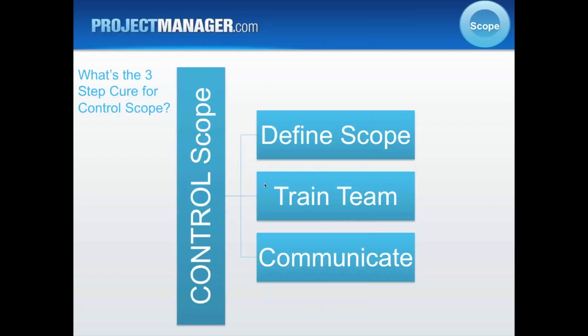It may be valid scope that needs to be added. However, when it is submitted to the change control board and goes through the evaluation process, it could be approved to include in this release of the project, and then they do the due diligence to figure out what's going in. Maybe this is included and something else is removed, or it could be valid and go into the next phase or the next release. So typically what the customer is trying to add is valid. It just needs to go through the correct process.